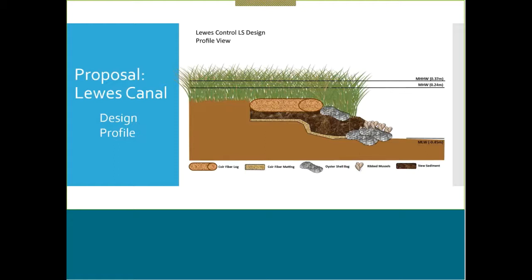I know you said you were going to tie into the previous project that was authorized. If you could have an expanded project plan view that shows where the property lines are, to make sure you're not encroaching on any other property in the vicinity, because it looks like you are crossing for 115 feet when I just measured. It looks like you're going to be crossing 2 of the Lewis Historical Society's properties, but just keeping that in mind is the property lines. You can include that on the project plan. And then, sure. Yeah, just a little bit more detail.